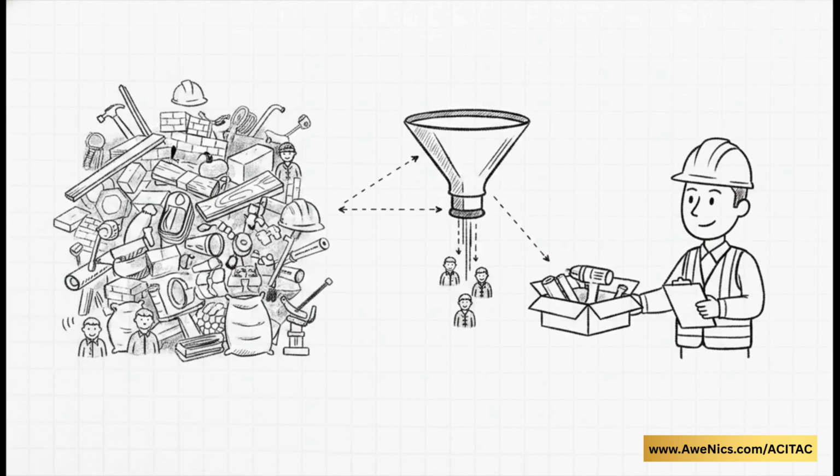You aren't just stuck with standard categories. Let's say you're supplying certain materials and specific equipment directly to a subcontractor. We'll call them Contractor A. Well, you can just create a custom group just for them. Then, with a couple of clicks, you can isolate exactly what Contractor A is costing you, what their usage is, and their specific start and finish times. It is top-tier management reporting built right into your resource ledger.